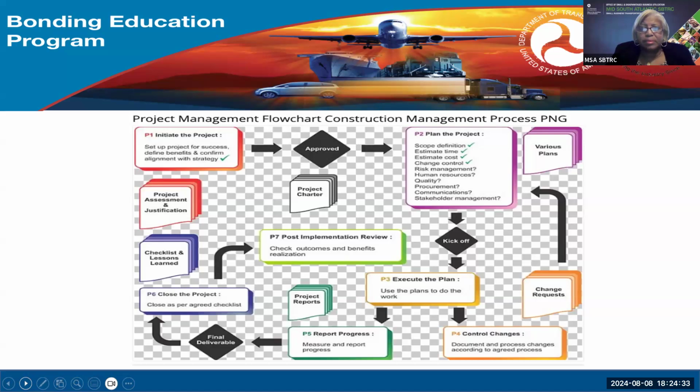Yes. Perfect. So in most cases, team, there's more time than you anticipated between when you put your number in and when they start the project. So what does that mean? That means as a project owner or a business owner, you've got to make sure your costs are right. If it's a normal amount of time between when you put your number in and when the project begins, you should audit where you are. You should audit your costs. You should make sure you know the extenuating circumstances that have changed. Your labor force, perhaps someone got sick or someone can't do it, or your subcontractors.